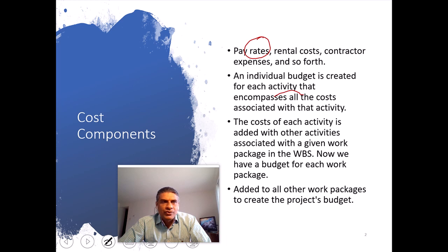So when we add those all costs together, we should be able to find out how much is plumbing cost, how much the carpentry cost, or in case of our vacation example, we should be able to see what could be the transportation cost. So if the WBS is also broken down into that particular bucket or work packages, then we can easily find out what is the cost breakdown for the overall project. What could be the labor, what could be the material, what could be the miscellaneous, what could be the travels and such.